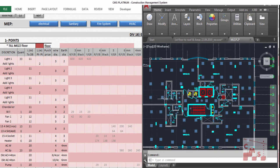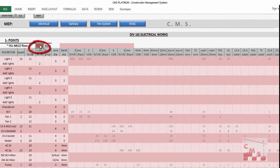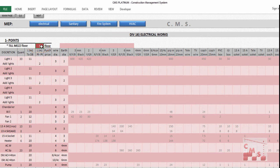You insert all the numbers of lights for the floor. If this floor is repeated for three, four, five or more floors, after inserting the number of lights you put the number of floors in the repetition field — the same approach used for structure work. If the floors are not typical, insert number one and calculate the lights for all floors individually, counting and inserting the total here.